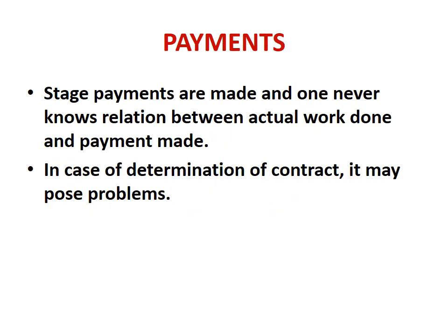Then let us talk about the payments. Stage payments are made in an EPC contract because one never knows the relation between the actual work done and payment made. So that is estimated in the tender document, and the provision is made in the tender document accordingly. In case of determination of contract, measurement becomes difficult, and whether an overpayment has been made or not, it may pose problems.